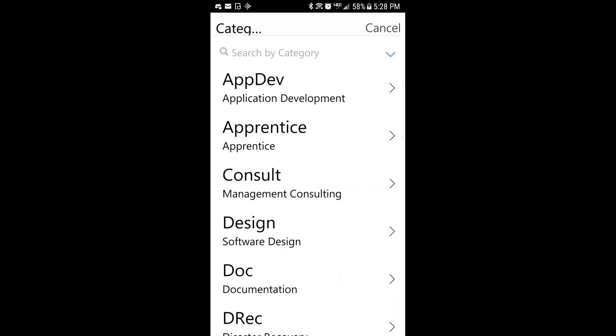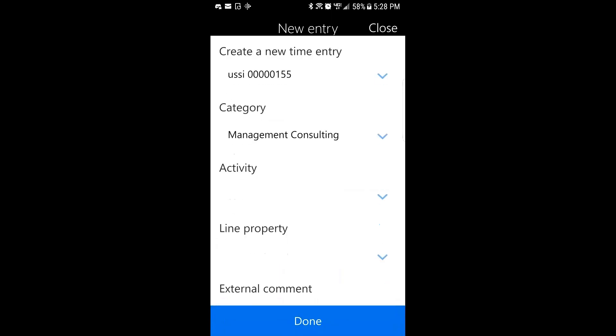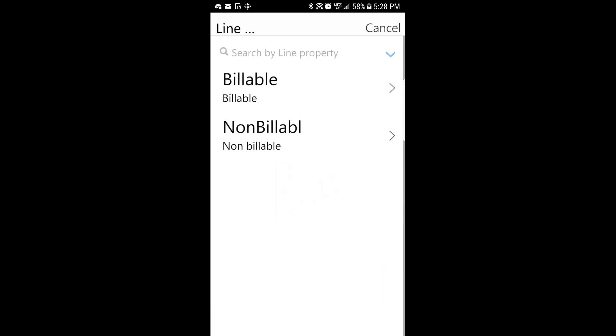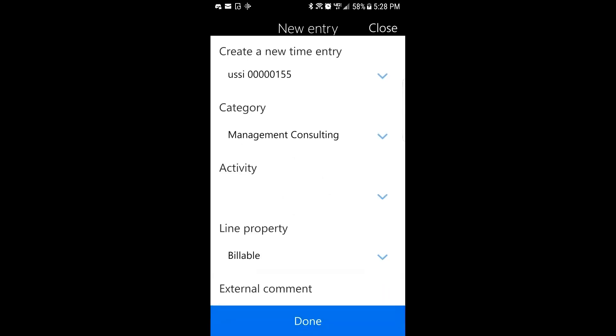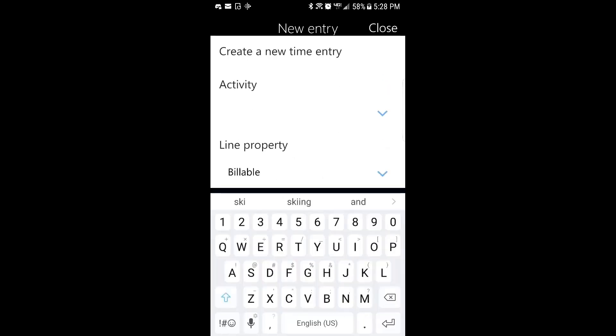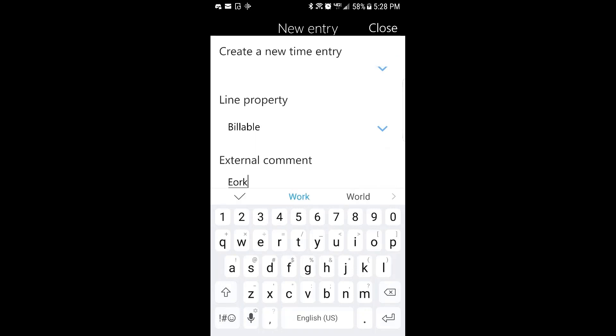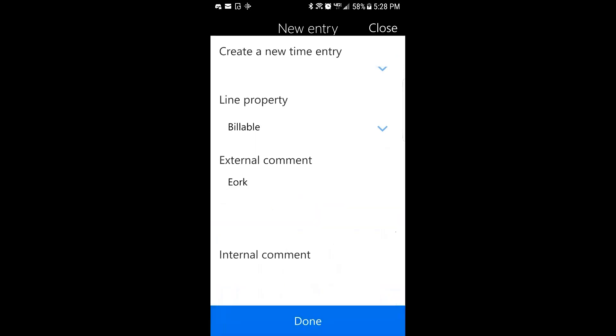For categories, you have the same thing. You can search through the list or you can just find and select your category. Activities, if you're using a work breakdown structure on your projects, activity will be available or it will be populated with a list of activities from the work breakdown structure. I'll choose the line property, say what I did, and then I'm done.